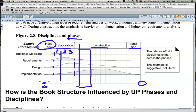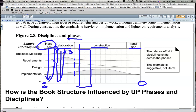This is something you work on during the inception phase. On small projects it could be several hours; it could be a few days or a few weeks. As discussed in the previous video, in each one of those iterations you cut vertically — you go through all the activities vertically and when you're done you go back to the next iteration. We do not go horizontally; that is called the waterfall model, which has been proven to not be very useful.